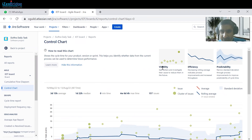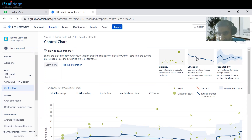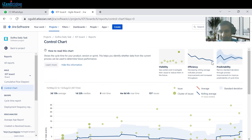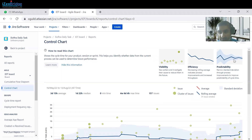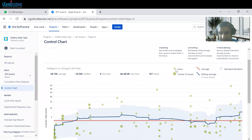You can see this kind of page is visible to us. For visibility, these kinds of symbols are being used. Efficiency: if our graph is moving in the downward direction, it means our efficiency is increasing. Rolling average means we are taking less time to complete our work. Predictability: if the standard deviation is getting lesser and lesser, our work is getting more predictable and we can predict our future in a better sense.